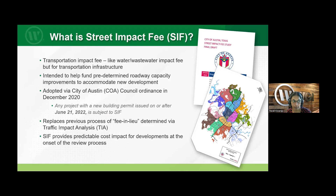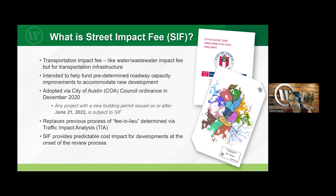Street impact fee, or roadway impact fee, is another type of impact fee — similar to water or wastewater impact fees — but specifically for transportation infrastructure. It's intended to fund roadway capacity improvements or capital improvements geared toward accommodating new development. In Austin specifically, an ordinance approved in December 2020 established that all new building permits issued after June 21st, 2022 would be subject to SIF. There used to be a fee-in-lieu option with all TIAs done in the city, but those went away with the street impact fee.